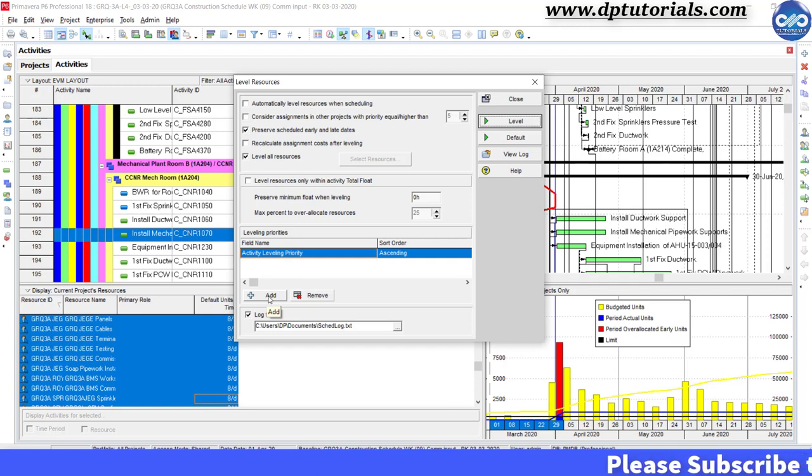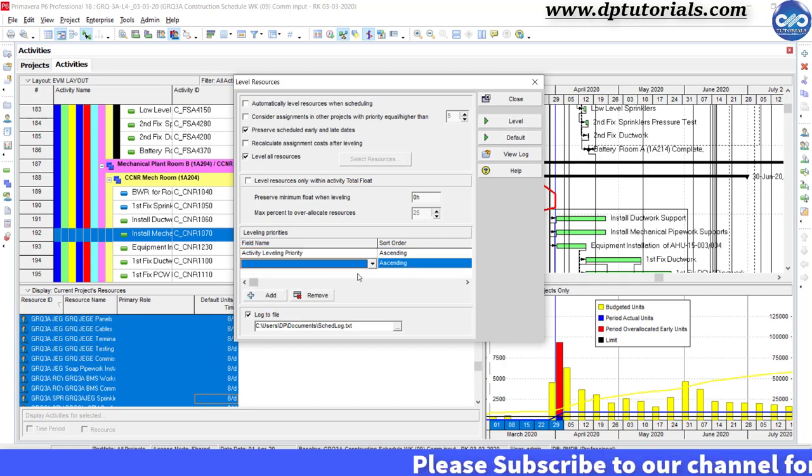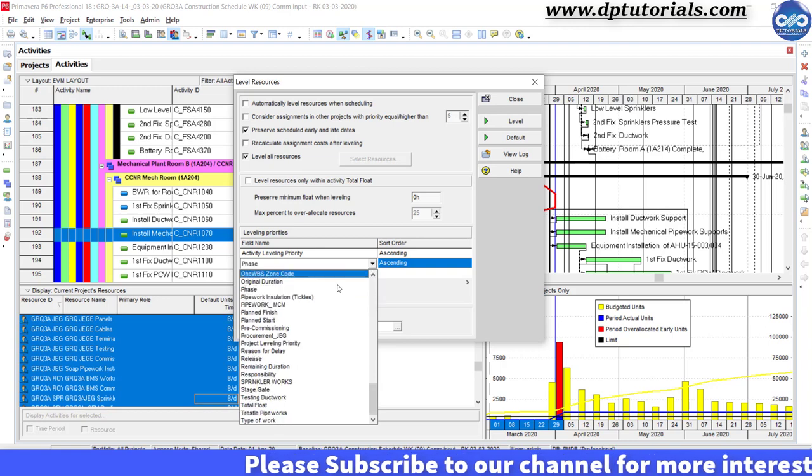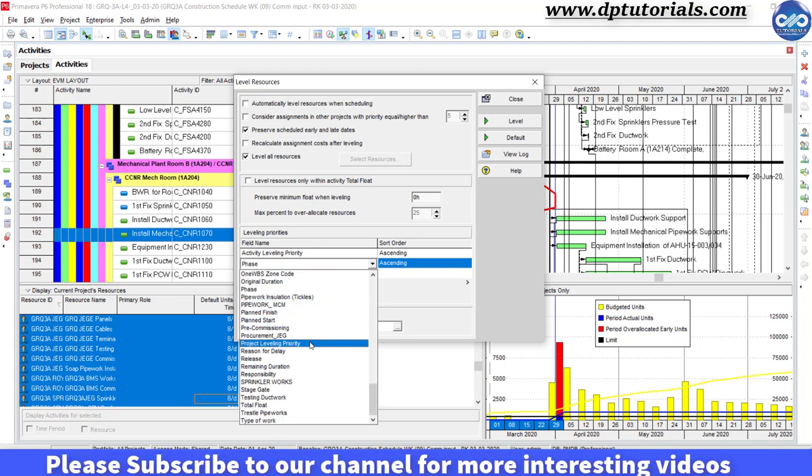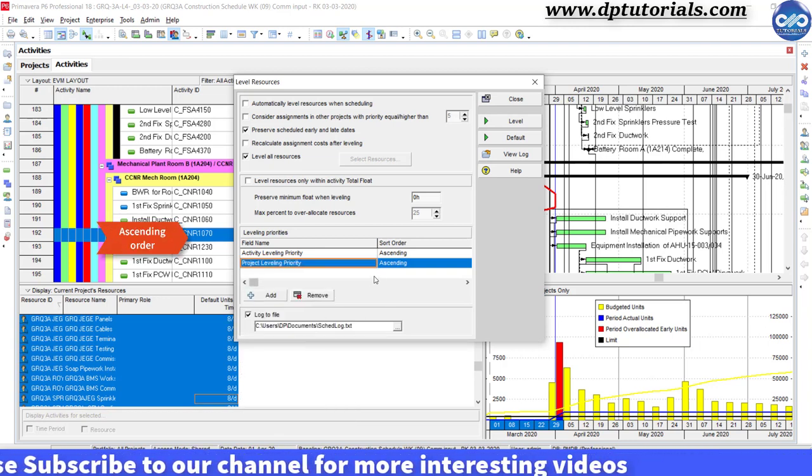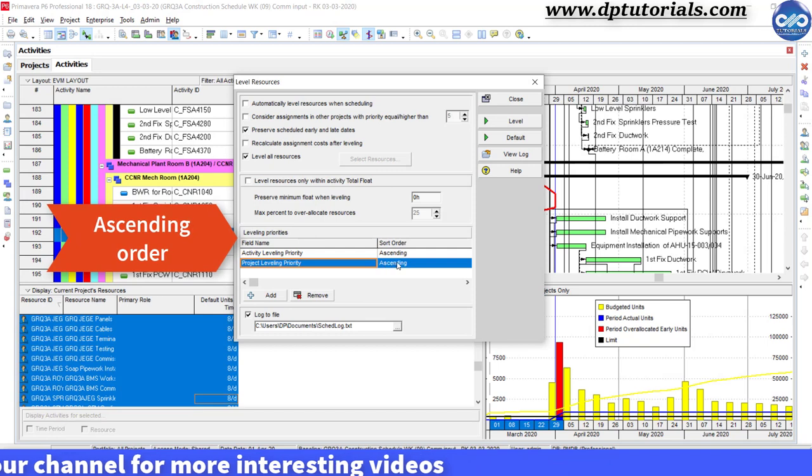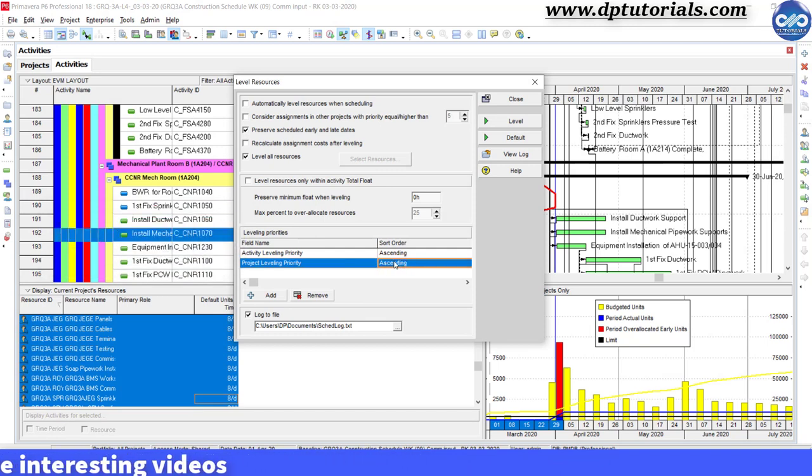Click on this add button to add each of your required leveling priority fields into this table area, and then determine an ascending or descending sorting order for each priority.